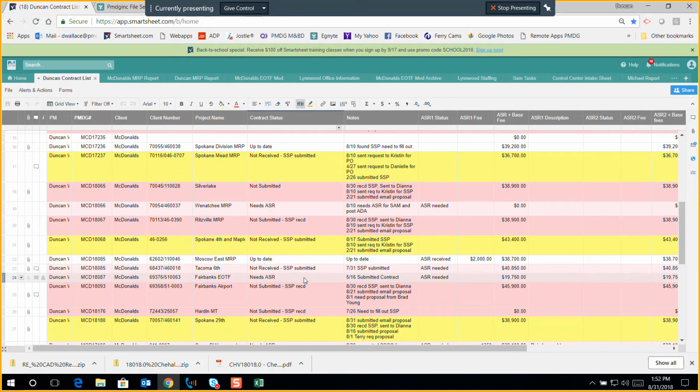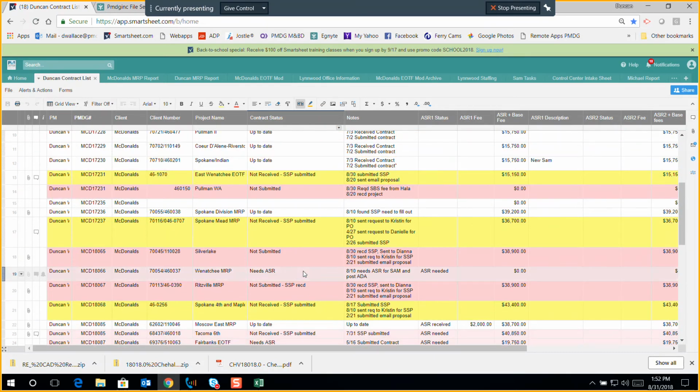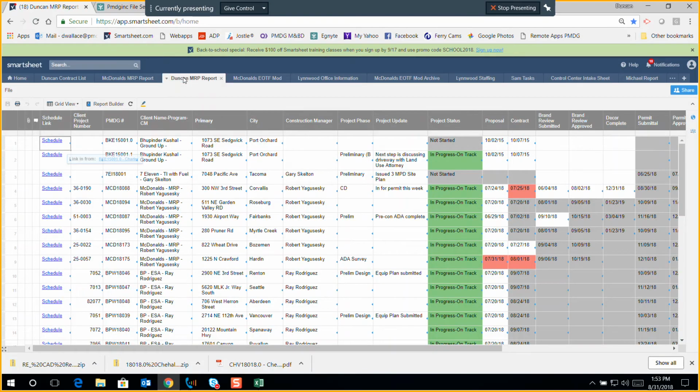I held one project. I didn't do anything. I told the ACM I don't have a PO. They said, you have my email approval. And I said, even though, I can't release consultants, and I can't invoice if I don't see a PO. And then he was running after her until they got me the PO. I told them it's just a risk. What if you guys changed everything? Then who's going to pay the bill? Yep, you got it.